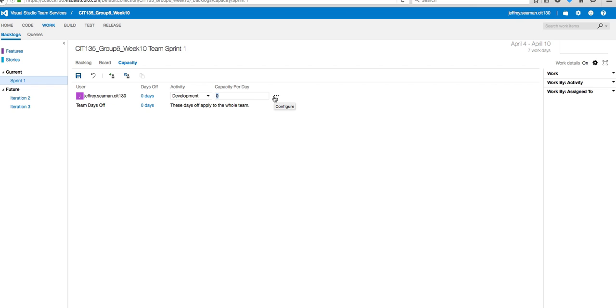Let's say hypothetically we're doing Monday through Friday. That's 5 days, and there's 40 hours in a week. And let's say I only have 4 hours a day. That means I only have 20 hours. It takes the time it's going to take you to complete it and evaluates how much time you have. So capacity per day, I'll put 8 hours. Because I'm running a 7-day cycle, it automatically says I have 56 hours of development time. Perfect.